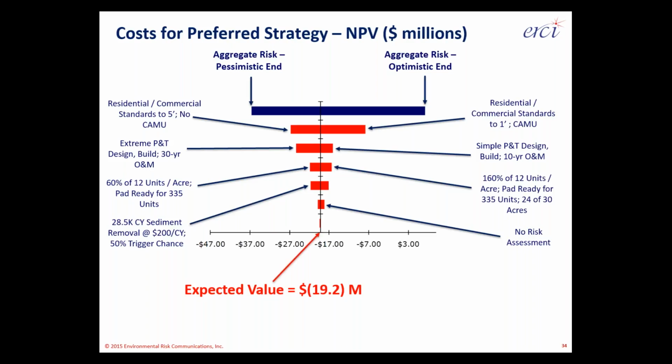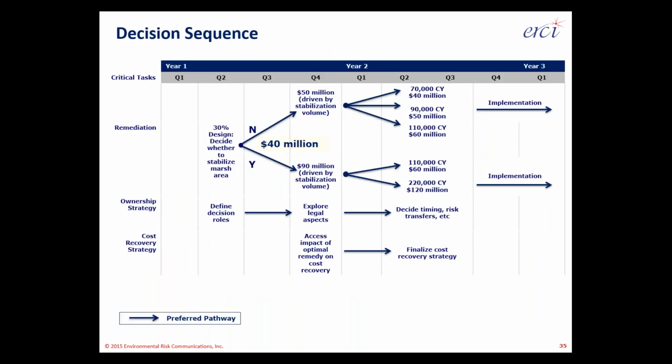So if you know this blue bar, for example, of where your site's, your project's entire basket of uncertainty is going to come from, and then bust it apart and say it's going to consist of these 4 or 5 line items, that's where all of our risk is going to come from. This analysis can help you figure out if you want to do different things in contracting, assessment, design, other project controls to make sure that these uncertainties don't kill your project, don't kill your solution. So again, these are parts of issues with defining the liability and also defining an implementable solution. Understanding these may tell you to spend more time on the higher uncertainty items, less time on the low uncertainty items, because financially you can't really have a major impact on those.